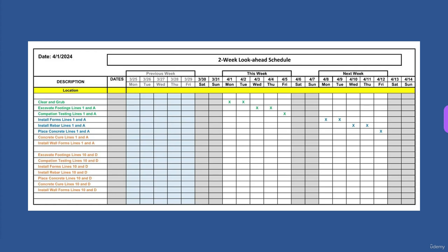One thing I like to do is, when I get to the next week, you can see that what was in this week last week is now in the previous week. And if it happened, great. I gray it out. Then you've got the green this week, so you can see how things shuffle down. And then the blue, again, is next week. And then the orange, I did this because it hasn't hit the schedule yet. I just did this to show you the comparison when I get to some other slides. You typically want to put things on there that aren't on your schedule.